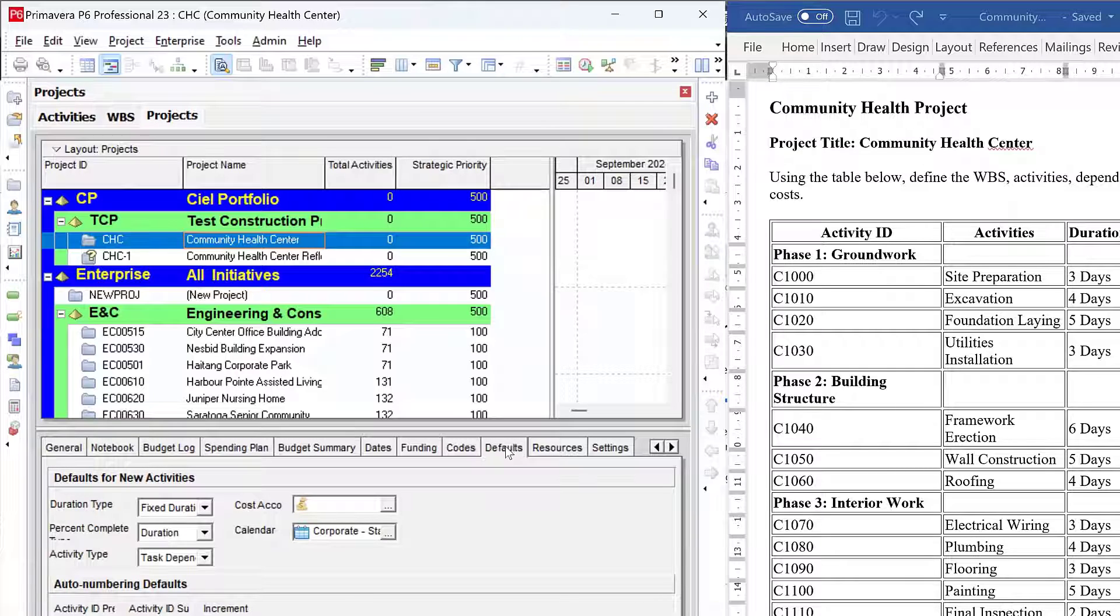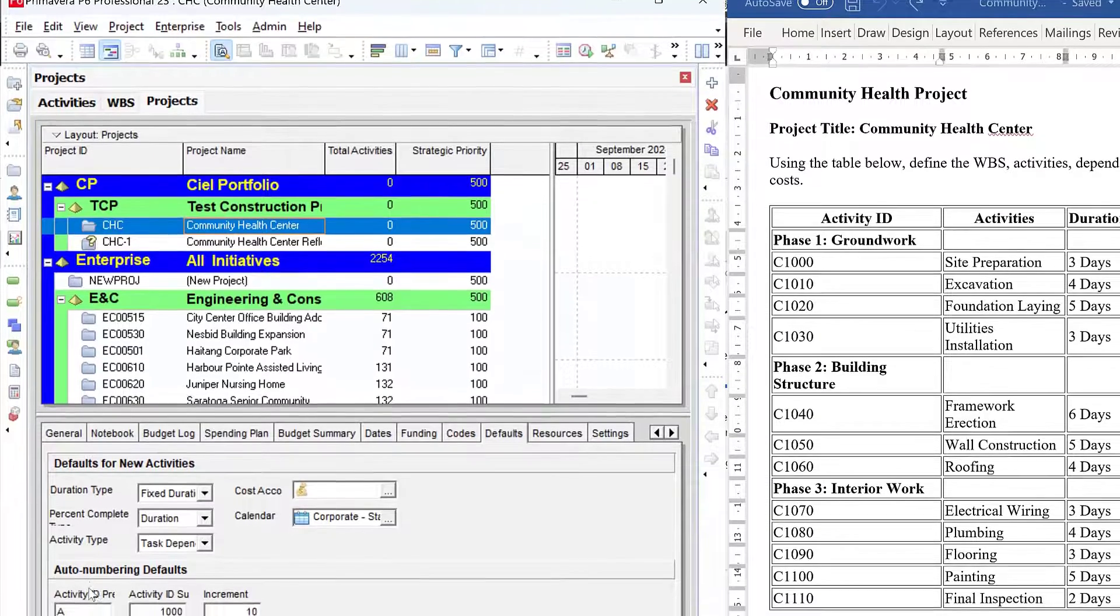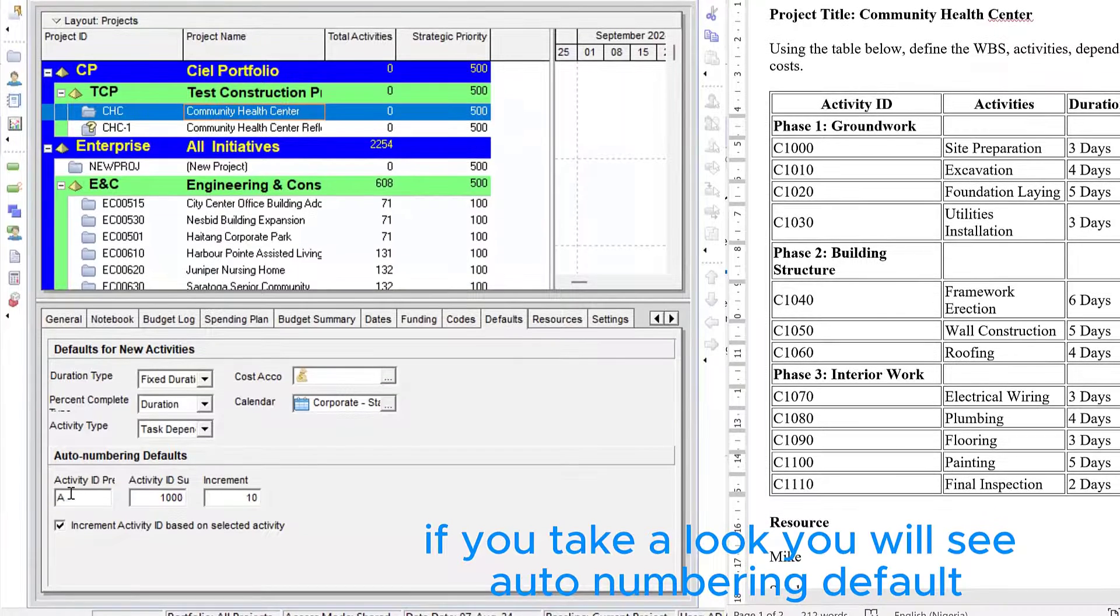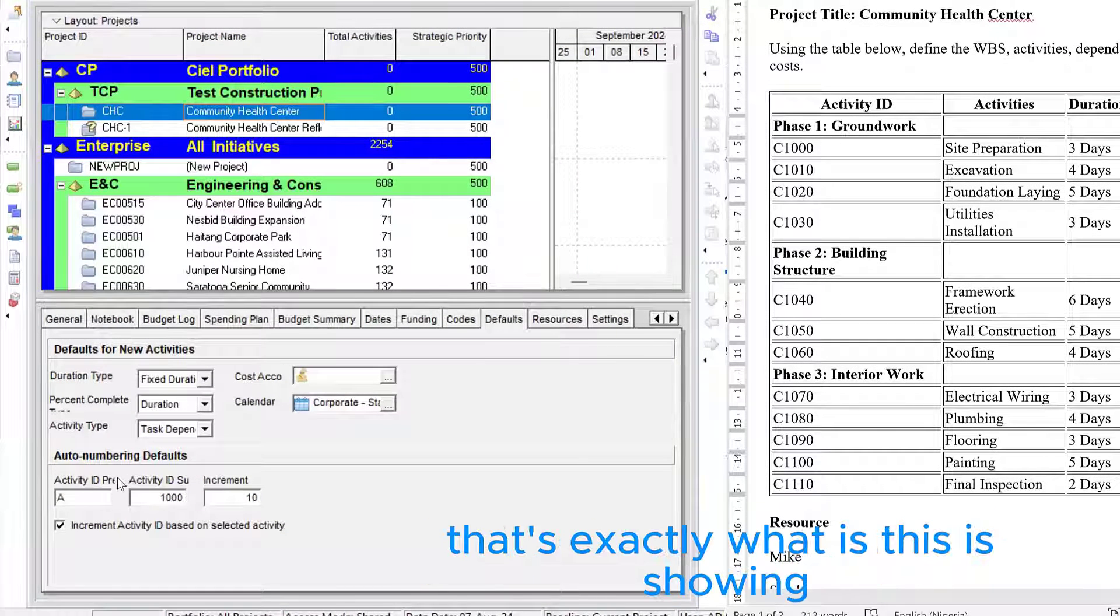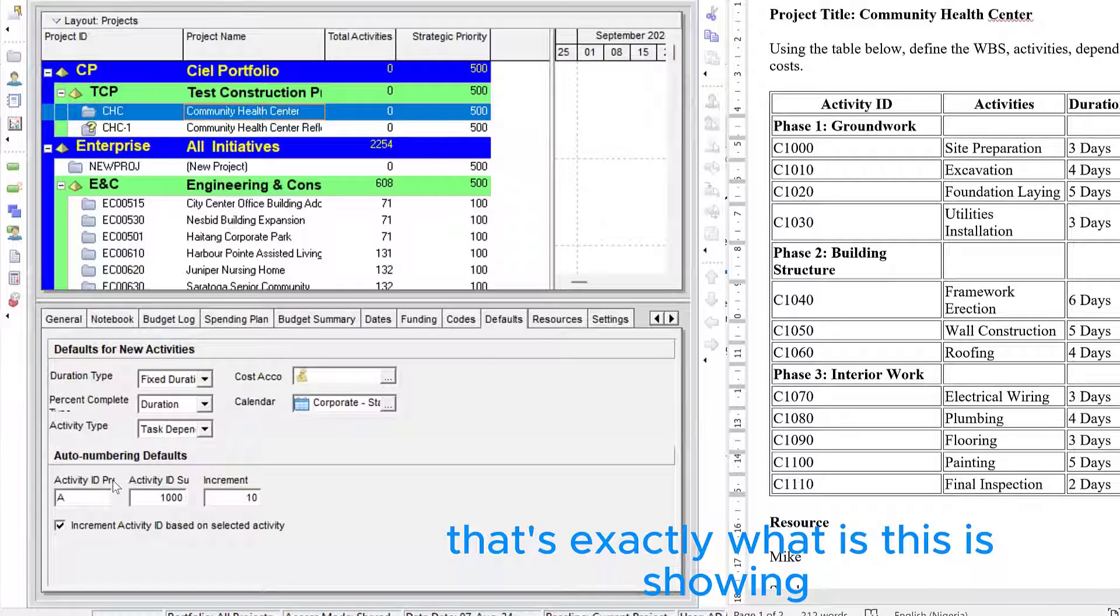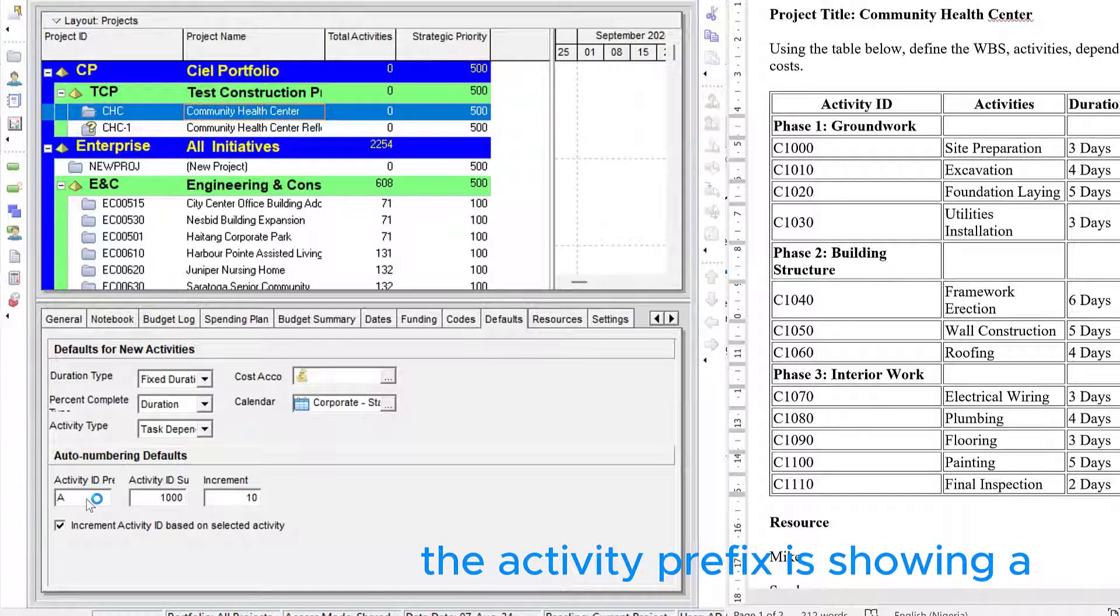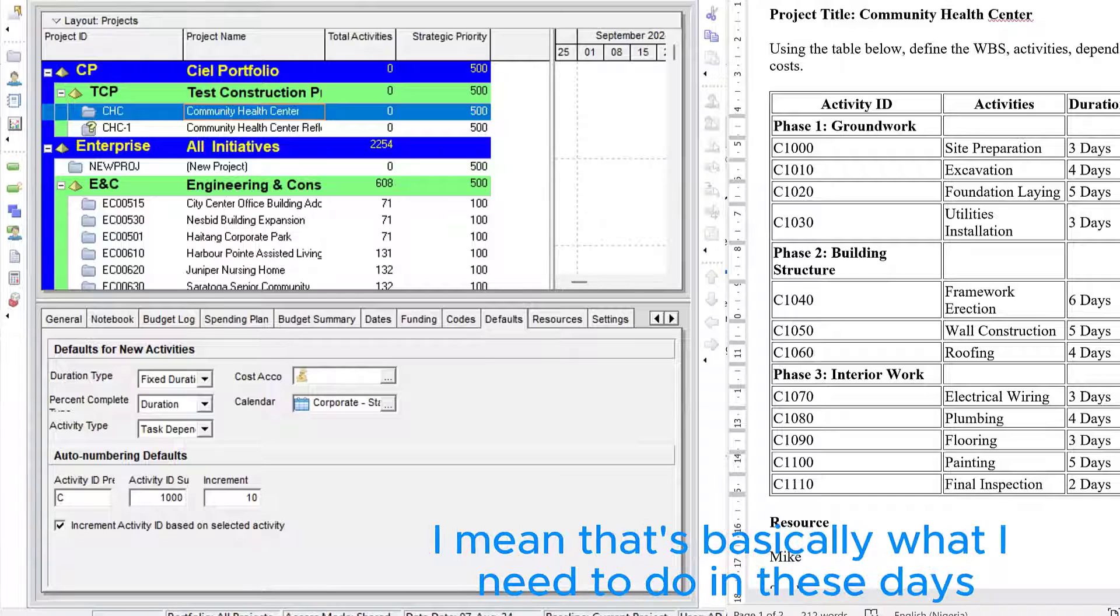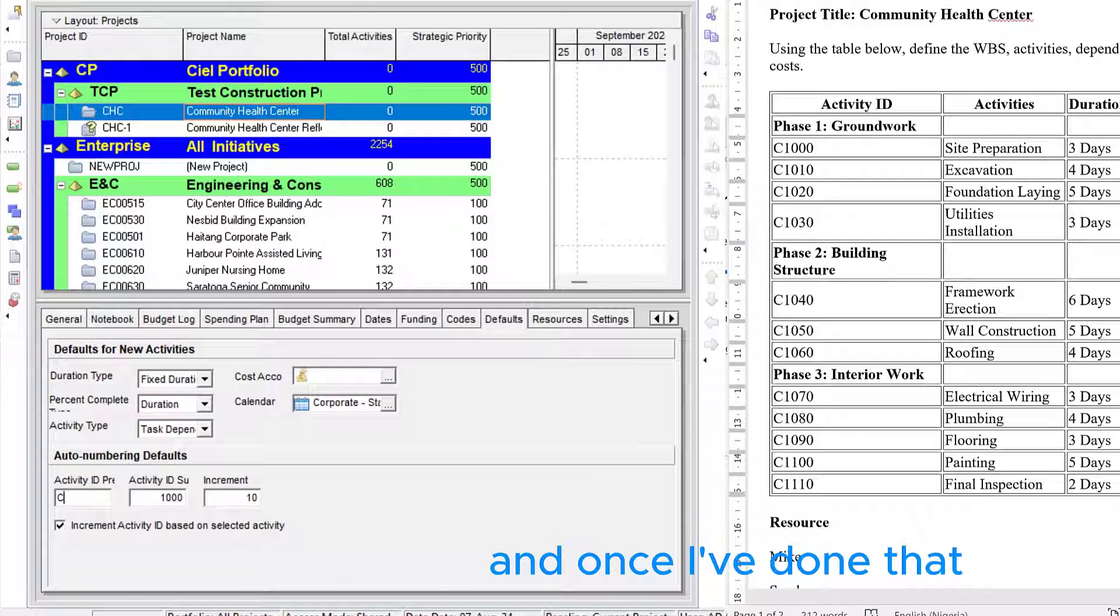In the Community Health Center project, I'll now go to the detail view and click on the default tab. This is the default tab in the detail view. So within the default tab, if you take a look, you will see auto-numbering default. You can see the activity prefix. That's exactly what this is showing. The activity prefix is showing A. All I simply need to do is change it from A to C.